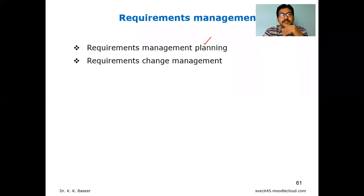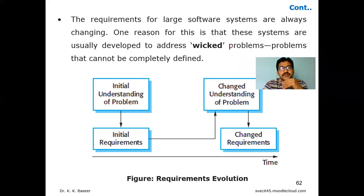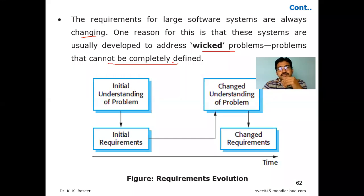The two sub-topics are requirements management planning and requirements change management. Before going into planning, let's understand how the evaluation of requirements is done. Requirements for large software systems are always changing — this is something everyone has to accept. One reason is that these systems are usually developed to address wicked problems, which can't be completely defined because the project is started without having any plan or collecting all background literature.